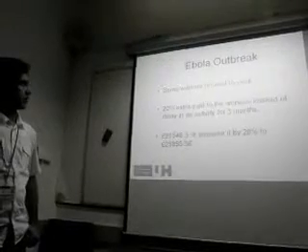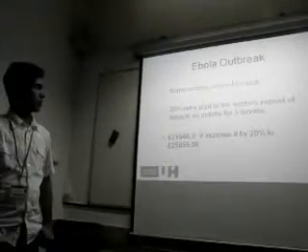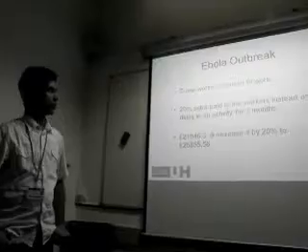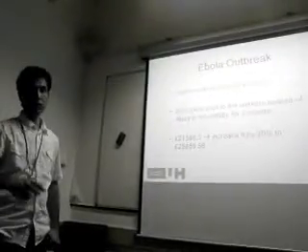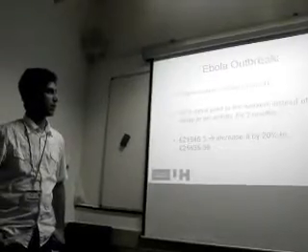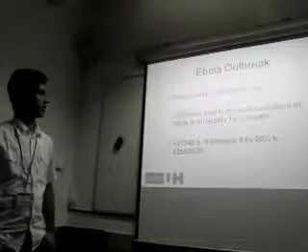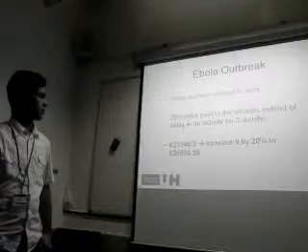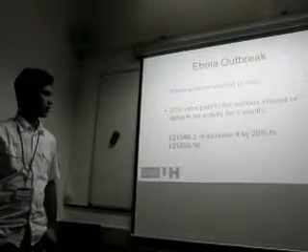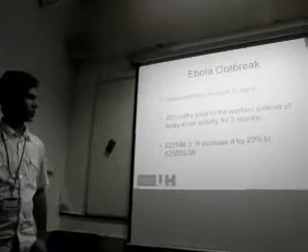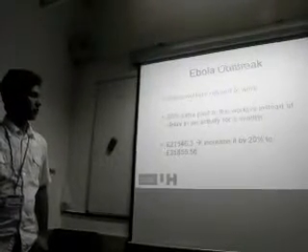We move to the next slide. Because of the Ebola outbreak, some of the workers refused to work there. So there were two options: either select new workers, make a new contract and find new people, or give some extra payment to these workers, that was 20% extra for 3 months.